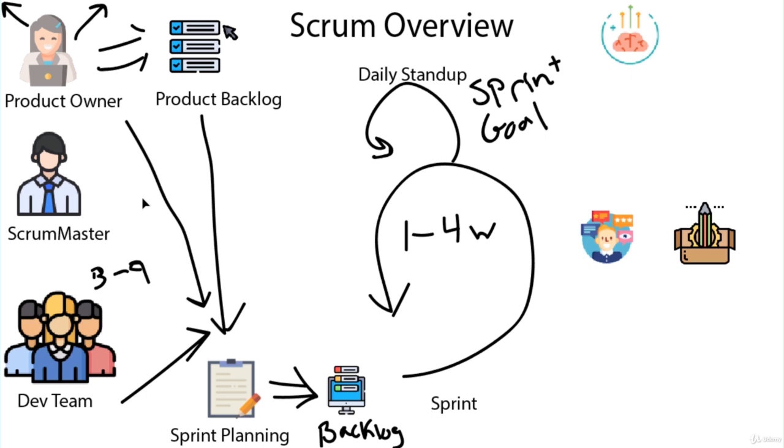You're not wasting everyone's time. Imagine a team of 9 people and you're trying to help a single person fix their web browser. It wastes everyone's time. 15 minutes is about the time box for this. You don't want your daily stand-up to be any greater than 15 minutes.